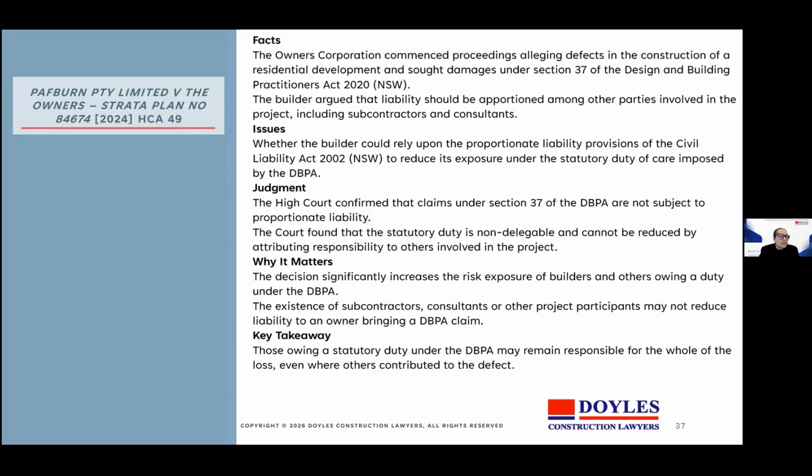The builder argued that liability should be apportioned amongst other parties involved in the project, and that included subcontractors and consultants. The issue was whether the builder could rely upon the proportionate liability provisions of the Civil Liability Act to reduce its exposure under the statutory duty imposed by the DBPA.